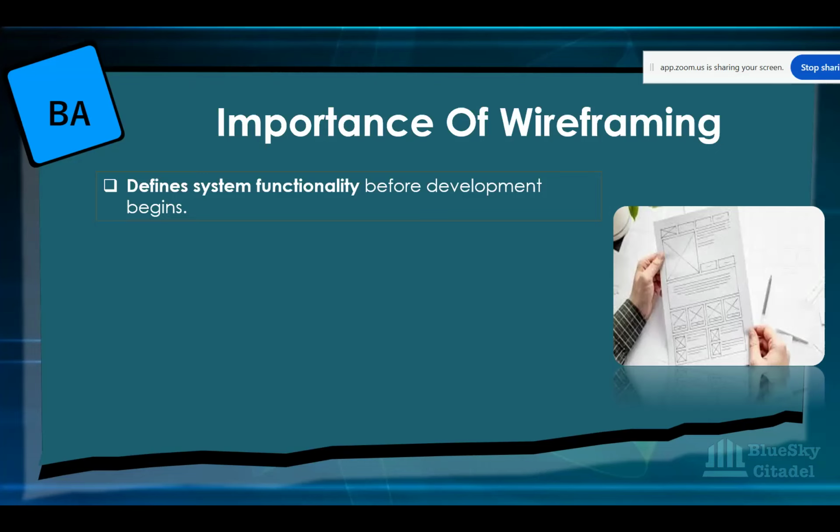But when you have an image of where everything should be, not only does the PO approve it before it gets committed to sprint, but the developer sees it, the QA sees it, everybody sees it. We're all in agreement that this is what this thing should look like. By the time the developer does it and brings what they have developed, it has to match the image. So it can't even pass, what do they call it, user acceptance testing until it matches the image of the wireframe, because this is how we told you it should be.